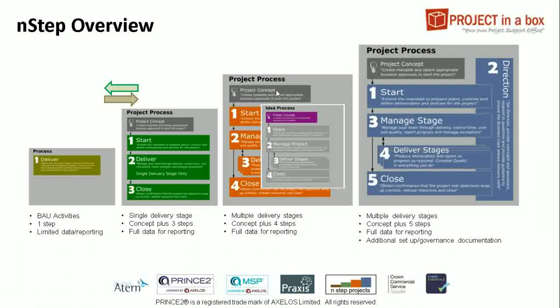The other thing to say is that for the multiple stage projects here, the 4 and 5, when you run them in Community Edition, you can only add a standard planned type stage, so one type of stage. When you run them in Personal Edition or multi-user platforms, there are 4 different pre-configured stage types available. There's a planned stage, there's an agile stage, there's a procurement stage, and there's a desk study stage. And you can add mixtures of those into your project.